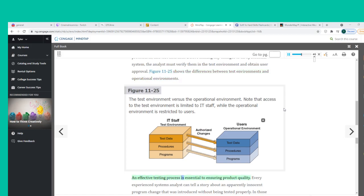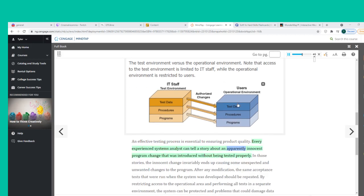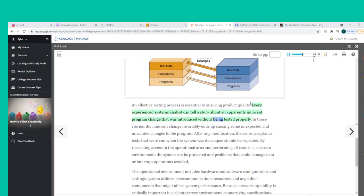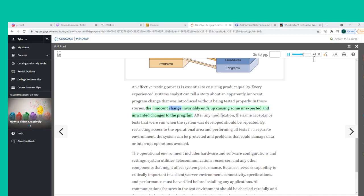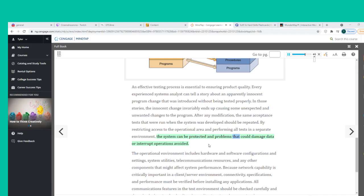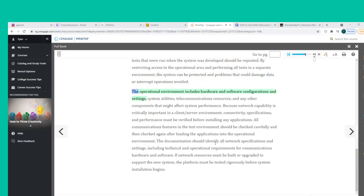An effective testing process is essential to ensuring product quality. An apparently innocent program change introduced without being tested properly can cause unexpected and unwanted changes to the program. After any modification, the same acceptance tests run when the system was developed should be repeated. By restricting access to the operational area and performing all tests in a separate environment, the system can be protected. The operational environment includes hardware and software configurations and settings, system utilities, telecommunications resources, and any other components that might affect system performance.